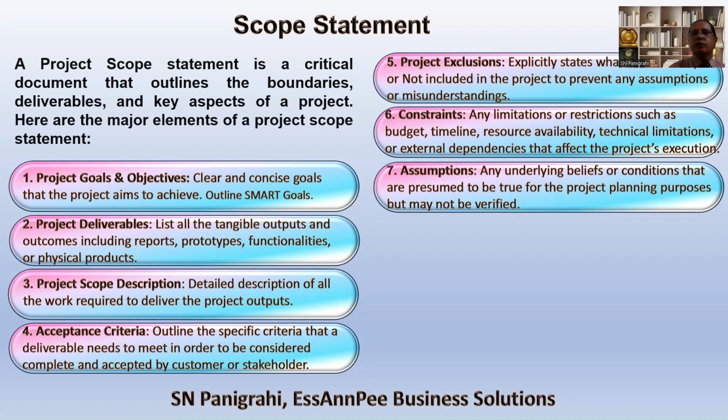Suppose at the initial stages of the project, we may assume that the interest rate on the loan we are taking from the bank is 12%. That is an assumption based on the prevailing rates. But during the execution, the interest rates may go up or come down. It need not always remain the same as we assumed. So when the assumption fails, generally projects run at a loss.